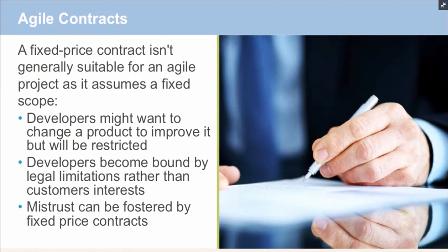Even when business goals can be defined in monetary terms, market forces and other factors outside a project team's control could prevent a customer from achieving its business goals. So it's generally better for a team to be held responsible for the scope agreed upon with the customer rather than for specific business goals.